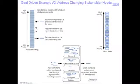Another example would be how do you address changing stakeholder needs? Throughout the project, your stakeholders will change their minds — they'll come up with new requirements and new ideas. In Scrum, they have this concept called a product backlog, which is a great concept: you've got this ordered list of requirements and you work on them in order, often in business value order. But that's not the only way of working. One easy observation is that we do more than just implement requirements on projects — we also fix defects.